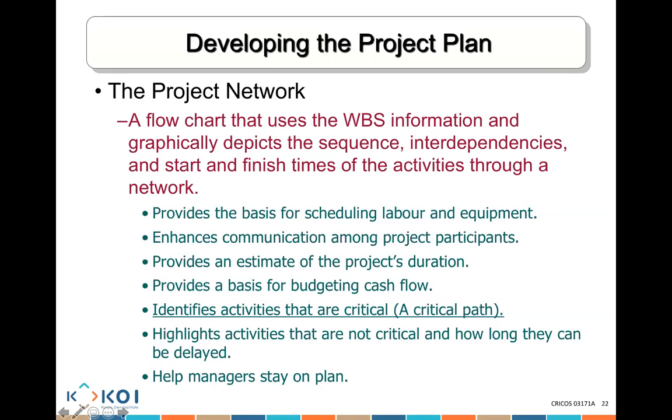We get a good estimate for the duration of our project. Because we know when each activity needs to be done, we'll be able to know how much money we need at each stage or at each activity or even at each day of my project, because we basically have calculated how long each activity is going to take, who's going to do it, and how much they get paid per day. We identify the activities that are critical.